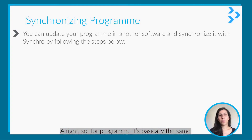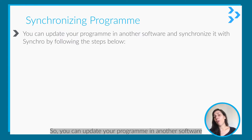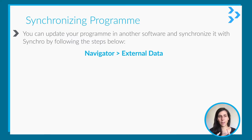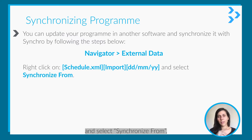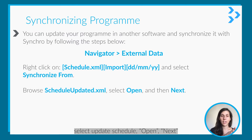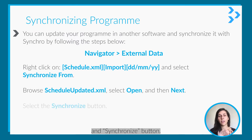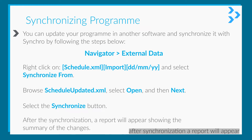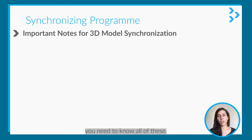This part is about synchronizing a program in Synchro. You can update your program in another software and synchronize it with Synchro using these steps: navigate to External Data, right-click on the schedule, select Synchronize From, select the updated schedule, click Open, then click the Synchronize button. After synchronization, a report will appear showing all the changes as a summary.